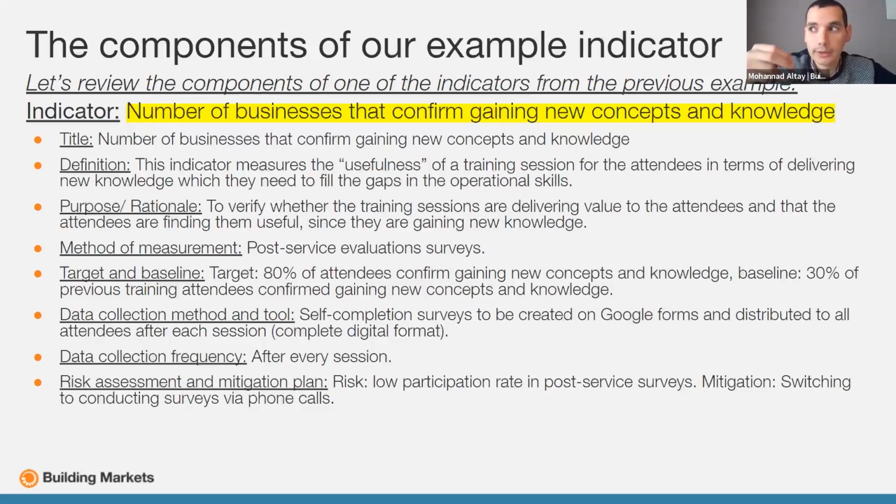Okay, it is to make sure that the businesses are confirming that your training session is useful to us, that we are learning from it. And this is why we need an indicator like this, because if the results come out negative, then we need to stop and understand why the people are saying, no, your training session is not important, is not useful to us, we are not learning from it. That means we need to take a corrective action here.